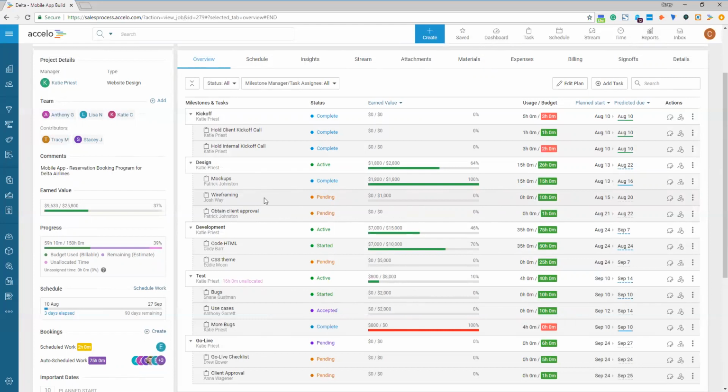So we do. A typical job, particularly larger projects where we have more than one developer involved at any given point, I'll take the estimated statement of work that's approved and then break it down into individual tickets. And then those will be assigned to the team, and then they use all of that to track their hours.